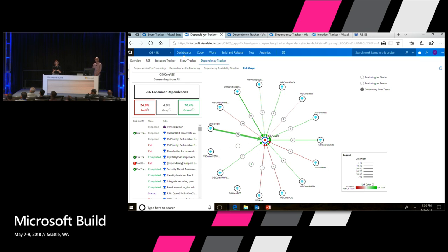As you can see along the top, there's a variety of filters I can choose that shows what are all the teams that owe me work so that I can achieve my story, or I can achieve the work I've set out to achieve. And you can see this all along the left. There's about 200 of these. So when I show that taxonomy with 130,000 tasks with 38,000 deliverables, this helps curate the 200 that really are critical path for getting the rest done. Allows me to operate nimbly while being able to see far.